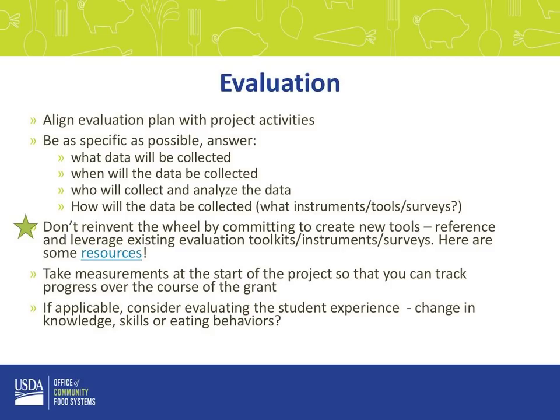So again, you don't have to get super detailed, but you're just trying to show your reviewers that you have been thoughtful and you've done your research and you are ready to go once you get awarded. A lot of times we see that folks don't mention that they're going to take measurements at the beginning of their project. So probably a good idea to take a baseline so that you can see from the beginning how you are tracking on your progress.